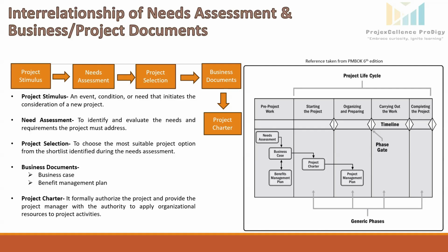So we had three options here: solar power plant, wind power plant, and the hydro turbine. So cost benefit analysis will be conducted: the initial investment, operational cost, the expected savings, and the environmental benefits of each option. All these things will be compared. It will be ensured that whatever project we are selecting should be aligned with the organization's and government's strategic goals.